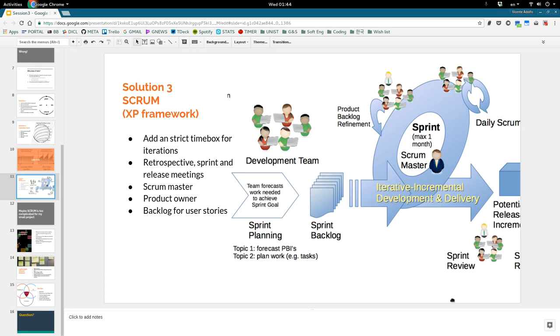And yeah, other than that, it's very similar to XP, where iterations are now called sprints in Scrum, but it's the same concept. So you have the sprint planning, sprint backlog. So for every iteration, you have certain user stories you want to implement. User stories are small features. So maybe, say, improve the performance of some website. That's a user story. And normally they're written as a user: I would like to, when I click this button, have this feature happen. That's usually written like that.